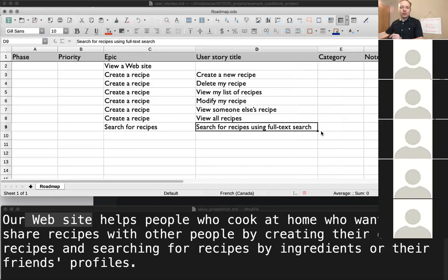You can ask your software developer team. They will tell you, oh, this is the big user story. You will need to split that user story into smaller technical tasks, like setting up the database or setting up the search engine, optimized database system, or that kind of stuff.